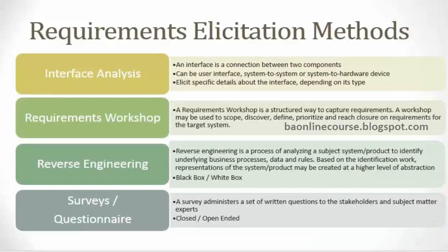Before this JAD session, the BA himself has to understand and do the as-is analysis of the system. He has to prepare his questions and also provide these questions to the SMEs first. The agenda needs to be provided to the SMEs so that they are well prepared to discuss the questionnaires which are going to be answered during the JAD session.